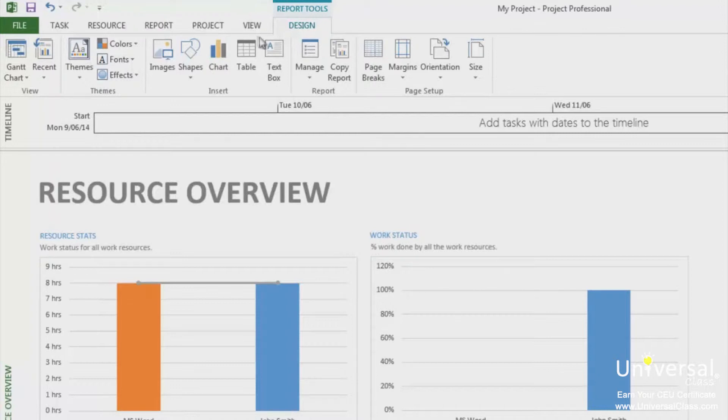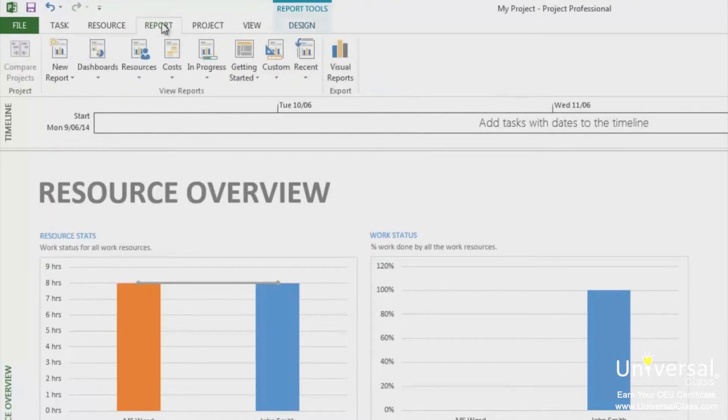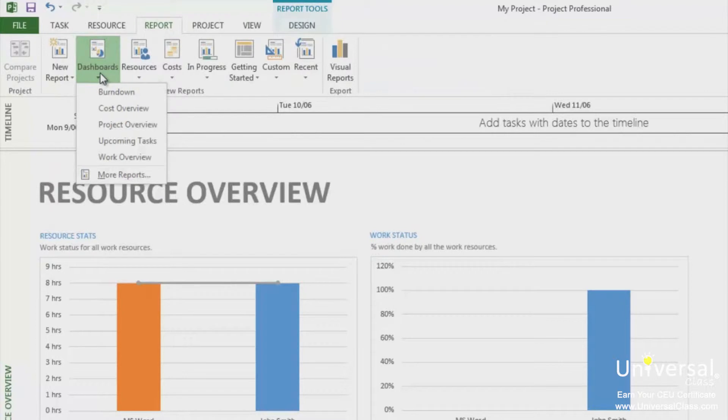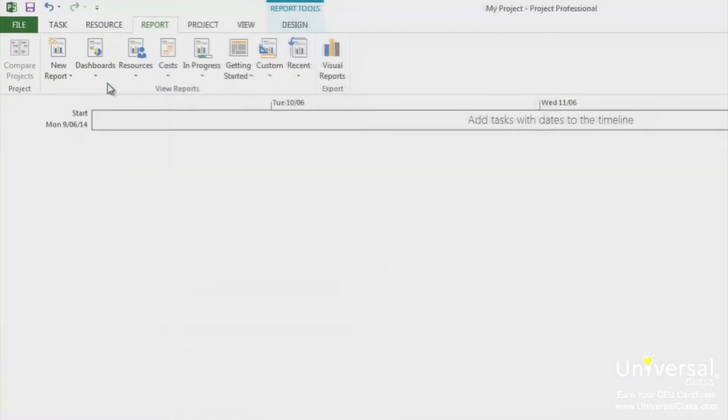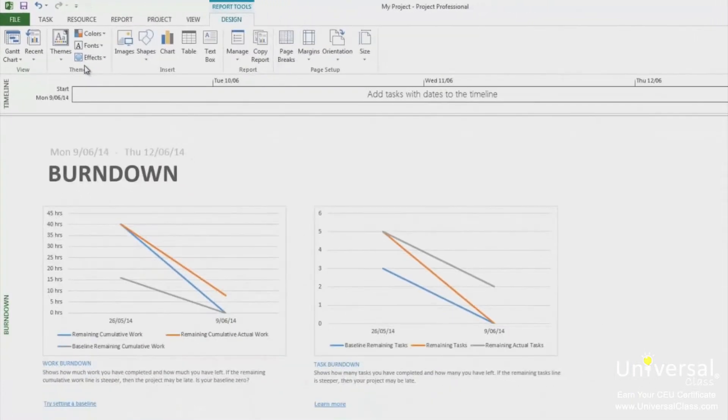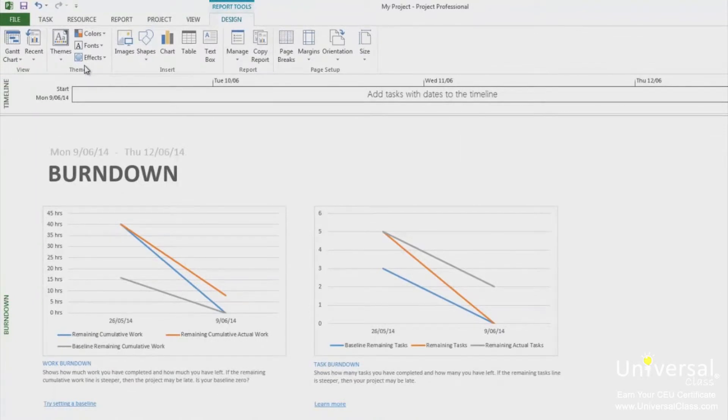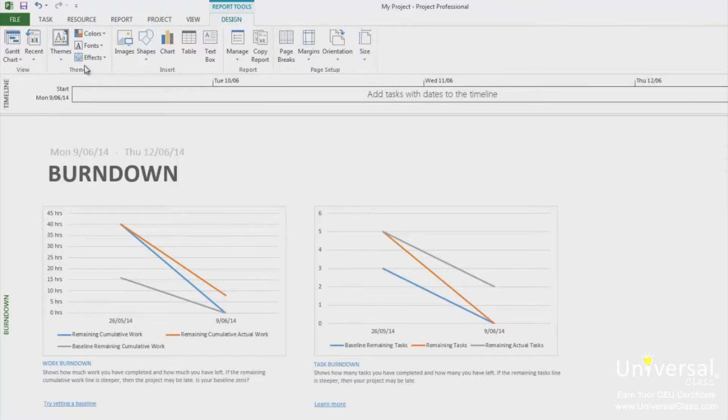And then select the report that you want. We're going to choose Burndown. This report is used to compare baseline work remaining to the amount of work remaining and the number of tasks remaining compared with the baseline tasks remaining. This helps you see whether you're working at the pace you planned or if you're in danger of falling behind.